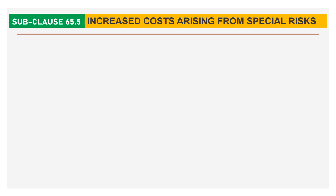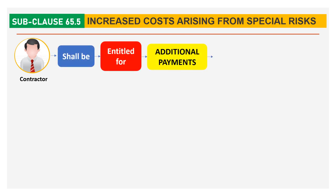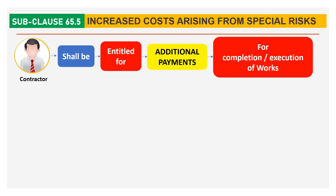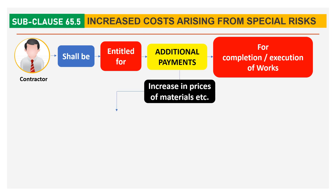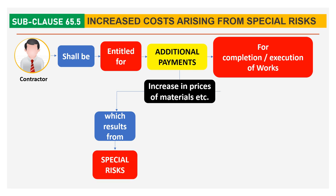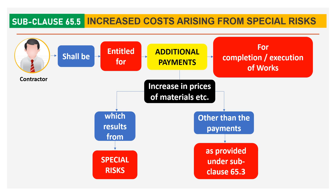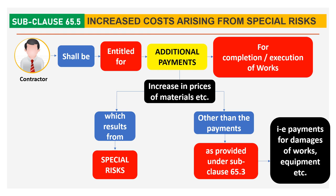Sub-clause 65.5 Increased Costs Arising from Special Risk. The contractor shall be entitled for additional payment for completion or execution of works. These additional payments would include increases in prices of materials and other like payments which result from Special Risk, other than the payments already provided under sub-clause 65.3 for damages to works and equipment.